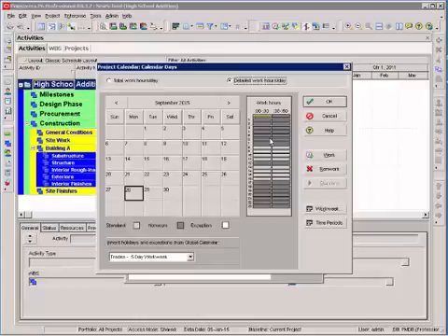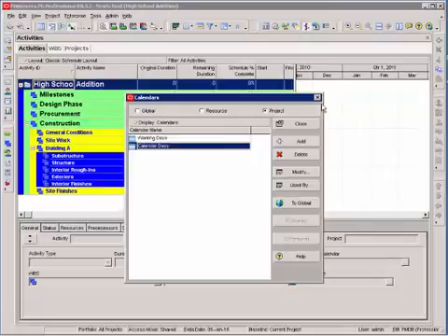Actually, you can't see it, but it would show starting at 4:01 p.m. And all of a sudden, your dates will be off. So it's very important that you're very consistent in your calendar structure and how you set those up to cause less confusion. So now I have 2 calendars, working days and calendar days.